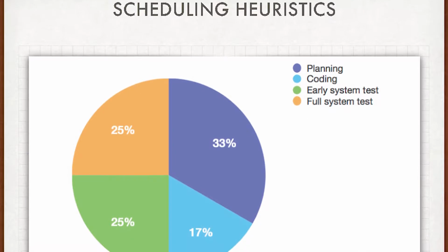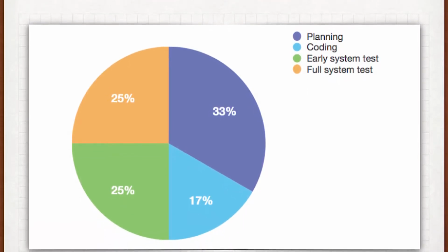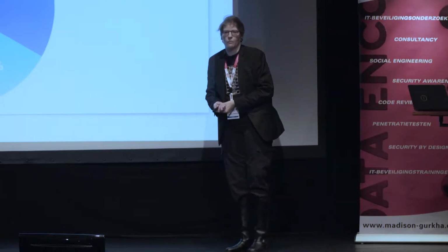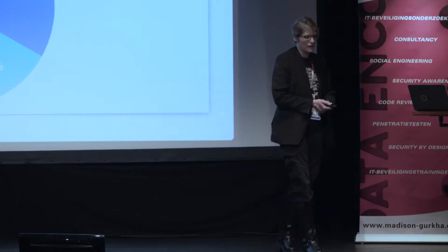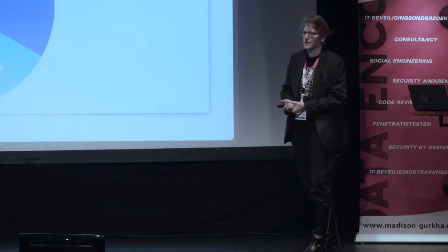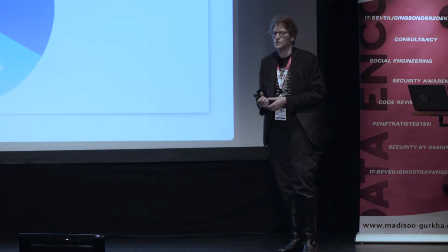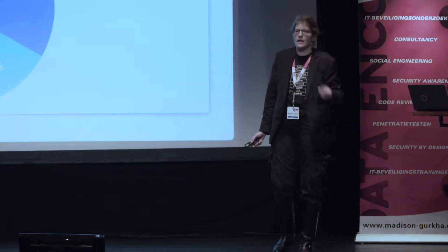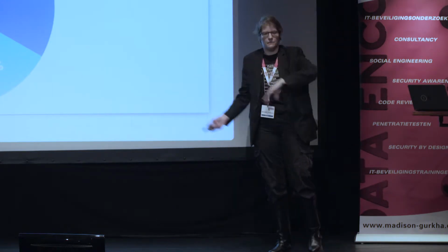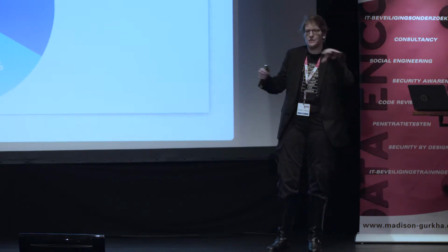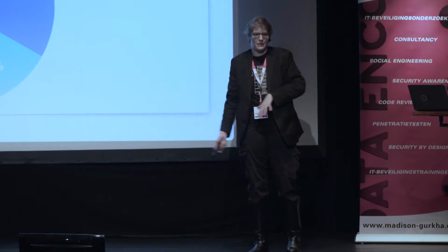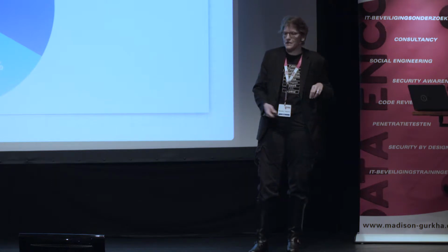Now, this seems like a crazy amount of planning in the days of agile software development, i.e. now. Brooks was writing back during the days of what we called the waterfall method, which has mostly been put to rest. You still see it used in some government and military shops, but by and large, it's fallen out of favor, because what invariably ends up happening when you make a big elaborate plan and then implement that plan is that you find that reality has shifted during the time that you were busy planning, and now you have to play catch up, replanning the things that people are already coding.